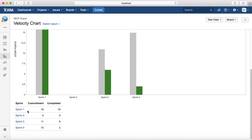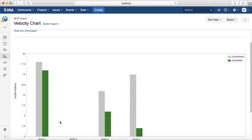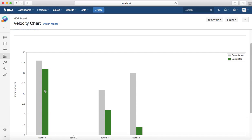It gives the tabular format what was committed in that particular sprint. So Sprint 1 commitment was 18, completed 16, similarly Sprint 2, 3, and 4. This gives you a clear picture of a particular sprint and how your team is actually achieving the planned points in that particular sprint.